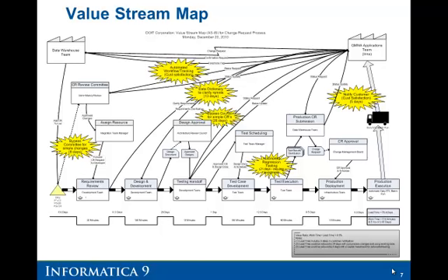While you're doing that, you identify each of the steps that's value added and how long it took, and non-value added and how long that took. And then you add up all the value add and the non-value add, and you take a ratio, and that ratio is the non-value added to value added tasks, and you try to minimize that. You want to minimize the non-value add.